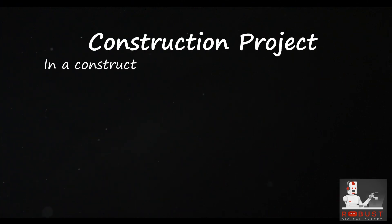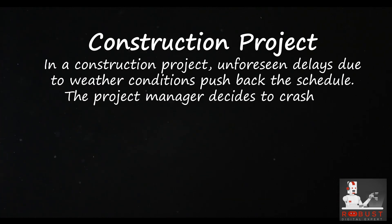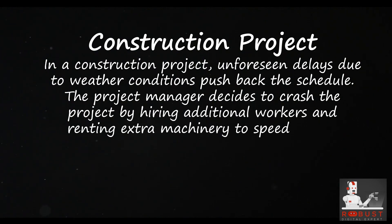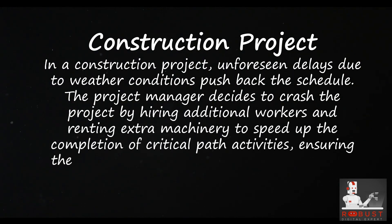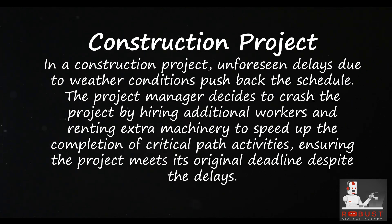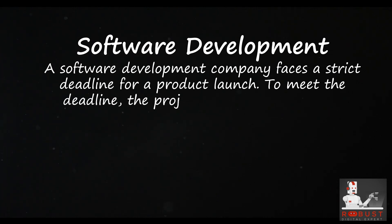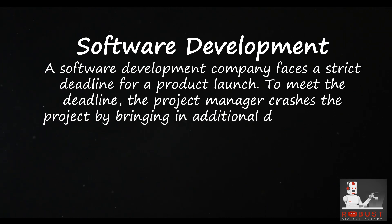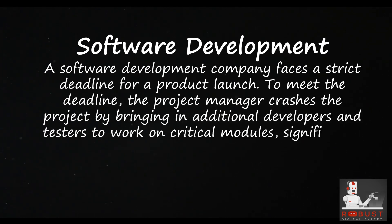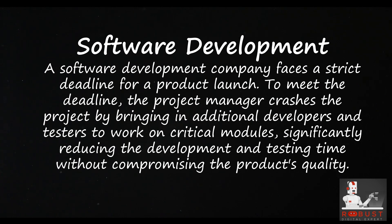Examples — Construction project: In a construction project, unforeseen delays due to weather conditions push back the schedule. The project manager decides to crash the project by hiring additional workers and renting extra machinery to speed up completion of critical path activities, ensuring the project meets its original deadline despite the delays. Software development: A software development company faces a strict deadline for a product launch. The project manager crashes the project by bringing in additional developers and testers to work on critical modules, significantly reducing development and testing time without compromising quality.